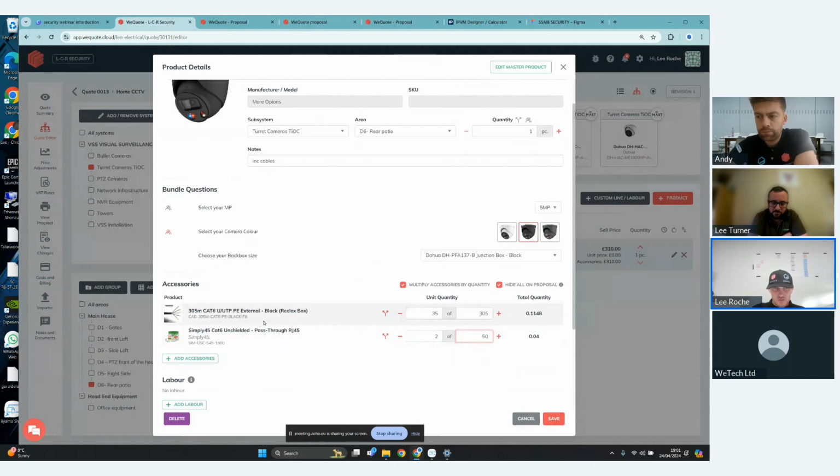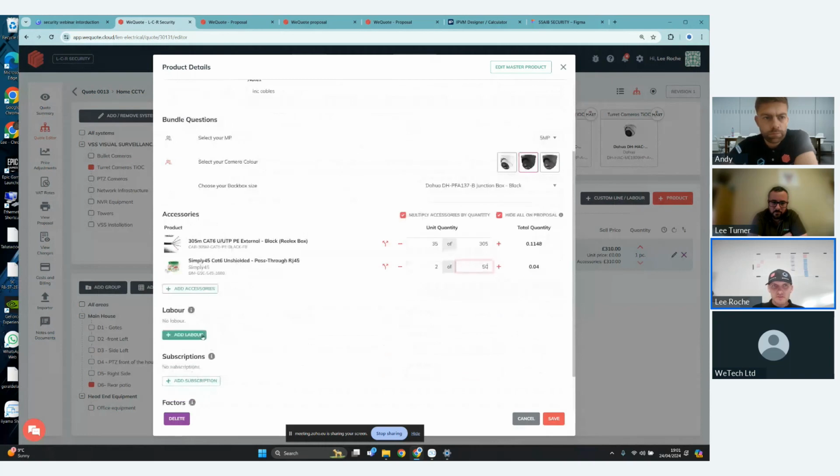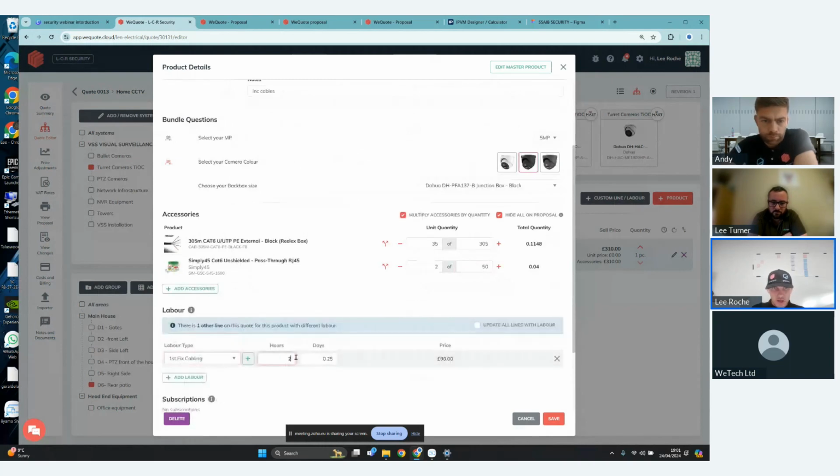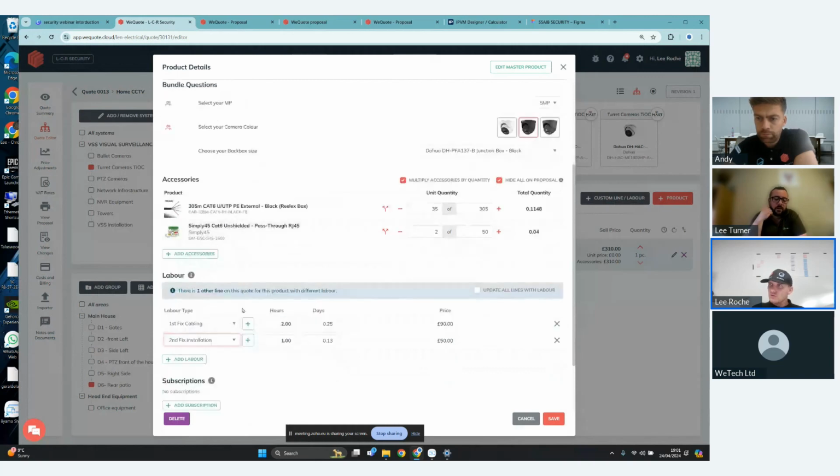So we've got our connections, we've got the cable, we know the camera. We can also add labor to this as well if we wanted to. So I could just say first fix cable in, let's just allow 2 hours. Let's allow an hour second fix in, so we can add that in. Now the good thing with WeQuote is it will then flag up and say, hey, Lee, there's another line on this quote where it's got different labor to what you're saying here now. So I can click this button and it will go, right, put the labor on that item as well. So I can tick that button, I can click save.